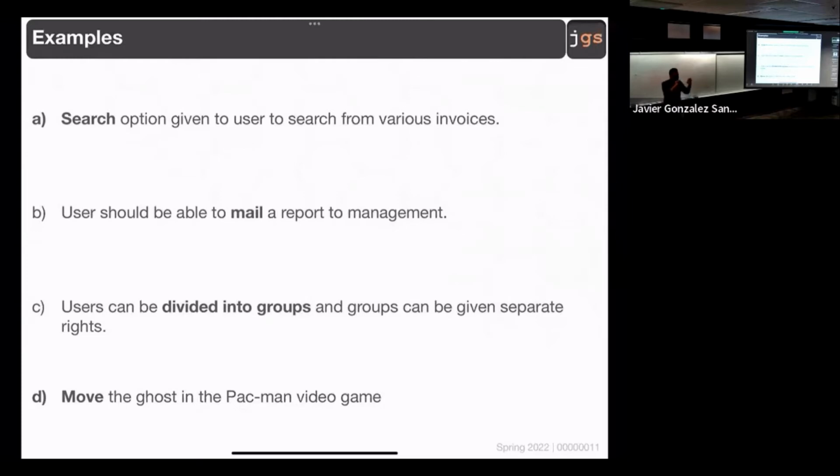And again, the common error is to think, no, it's not independent because first the user needs to connect to Zoom and then you can create the groups. Not really. I can create the groups and I am going to put inside of the groups the people that are connected. And if there are no people connected, there are not going to be people in the groups. But creating the groups can be done without or with the people. It's a functionality that I can develop that is independent from other things. The value, the estimation, the testing, I think all of that is there.